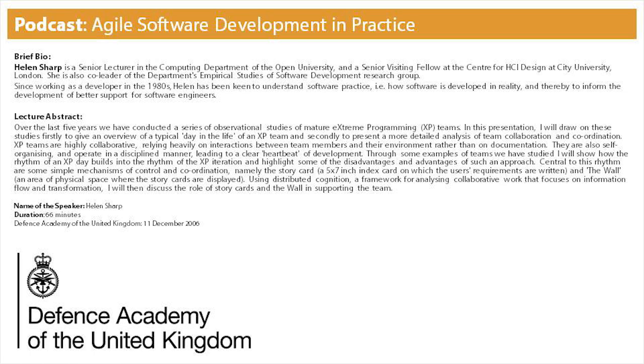Who takes part? The developers will take part, the customers will take part, managers if there are managers around. It's anybody in the team, and of course anybody who's co-located or who can be available by video phone or audio phone. The teams I'm talking about here were all co-located. However, a team I'm working with at the moment are not co-located, and the customer is off-site, so when they run their stand-up, the customer calls in. There's a phone in the middle of the table, basically, but they are available at the time for the stand-up.